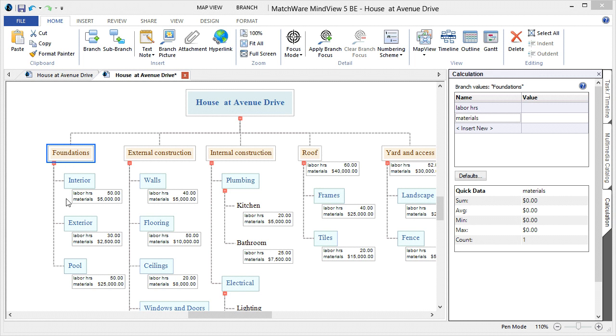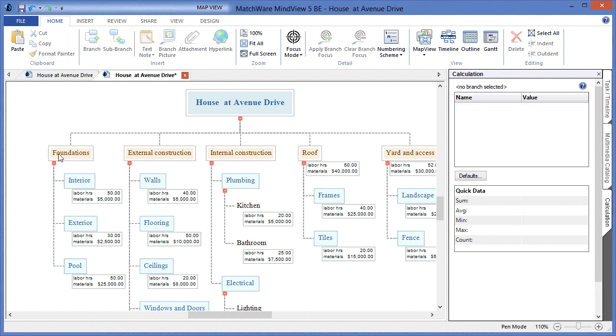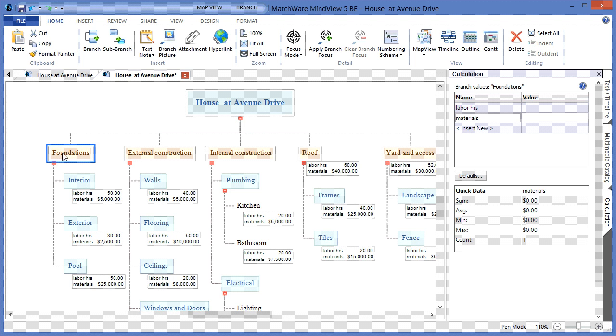There may come a time when you'd like to run totals on these specific pieces of information to group those in the deliverable stage. To do that, you would simply choose to click on the corresponding deliverable, choose the same field out of the calculation module, and simply choose Sum.